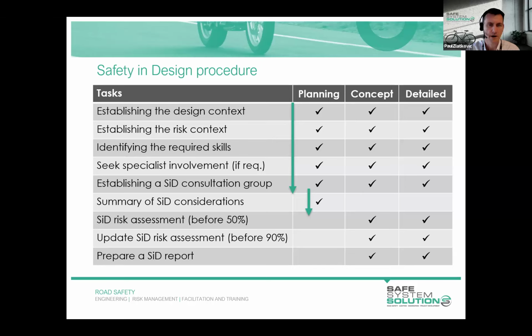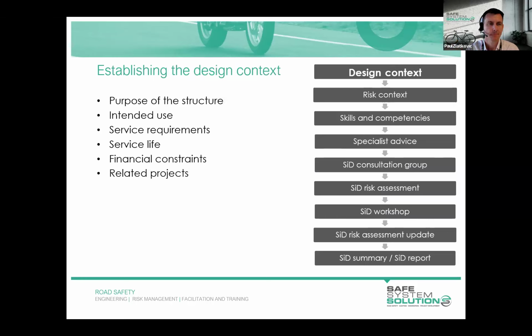So you can see there, when you're in the planning stage, we will summarise our safety and design considerations. I'll talk about that in more detail. And when we're in the concept and detailed design stage, we're undertaking a structured risk assessment and preparing a safety and design report. So I'm going to go through each of those tasks in a little bit more detail now.